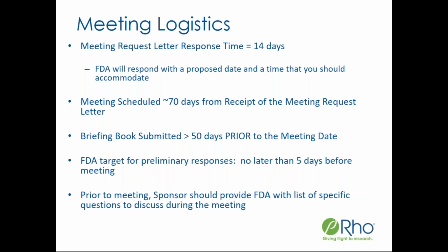So, I've spent a fair amount of time talking about preparing your package, preparing your questions. I haven't said one word about the timing until now. The timing laid out here is per FDA's guidance. The meeting is generally scheduled within approximately 70 days after FDA receives the meeting request. Your briefing book, however, is due 50 days before the meeting date. And FDA has 14 days to reply to your request for a meeting.